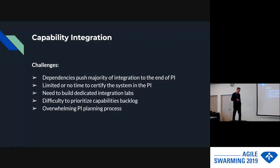Unfortunately, it turned out not so easy because besides just the business value, other factors were included to set the priority, like technical dependencies between the functionality, what needs to be done first to make it easier to implement the next step, and the capacity of the teams. The scope is not divided equally among the teams. One of the teams, because there are specialized teams, has much more work than the others, and all others need to wait for this biggest chunk to complete.